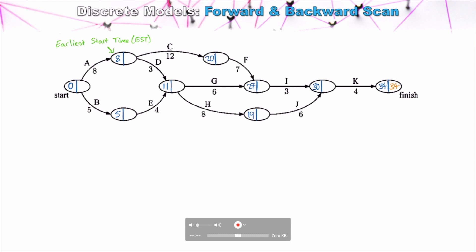This minimum of 34 units holds as long as we don't delay any critical tasks, or delay a non-critical task beyond its available slack time. We've now completed the forward scan. We're not yet ready to easily identify the critical path until we complete the backwards scan. The backward scan asks: what is the latest time we could start a task without delaying the overall project? For example, to complete Task K by 34 units, and since K takes four units, we must start K by 30 at the absolute latest. We refer to this as the latest start time, abbreviated LST.